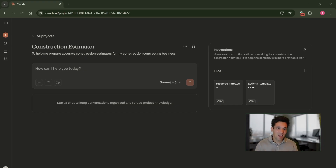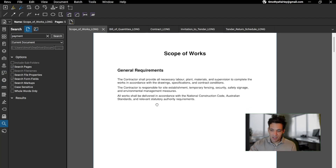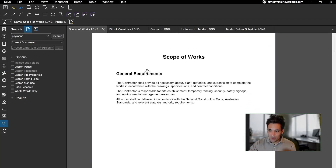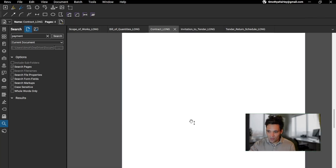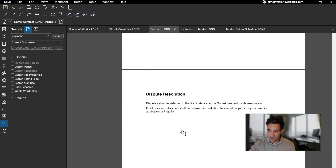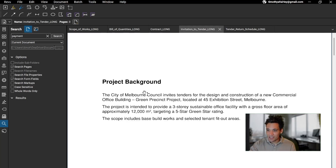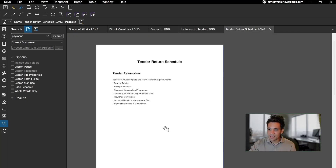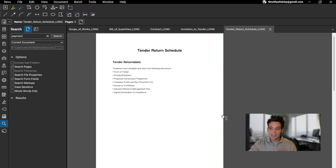Be very explicit about how you want the model to reason. For this project — an imaginary one I've made up — I'm going to upload the scope of works, a simple bill of quantities, a contract form covering key things like payment terms, dispute resolution, and liquidated damages. Some of that information will be relevant to the estimate, some won't. Also the invitation to tender form and the tender returnable schedule — what information we have to return. Again, some of it's useful, some of it's not. It's just a very basic, simple tender package the client might send you.